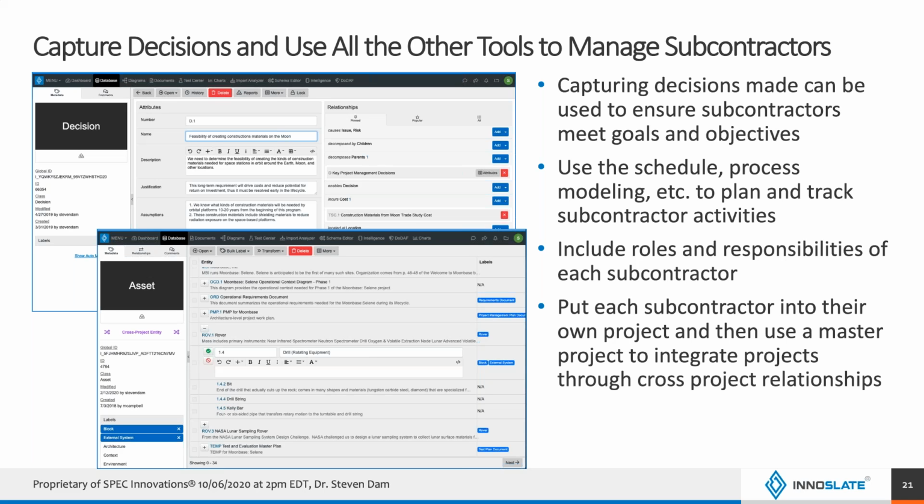If you give contractor A access to your master project, that's okay, because they still can't see anything that contractor B put in there. If they go in themselves and look at your master project, all they'll see is the information they're available to see. So unless you gave them access to contractor B's project, they wouldn't see the information.